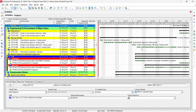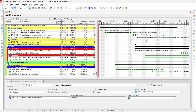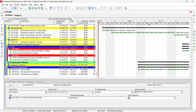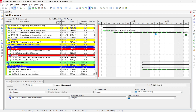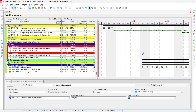With bar necking enabled, all non-working days will be shown as notches within the activity bars. Be aware that when working days are displayed this way, it shows only the actual working hours — for example, from 8 a.m. to 5 p.m. — so the bar does not fill the full day. If you enlarge the view, the working portion of the bar covers only 8 a.m. to 5 p.m. Make sure the global calendar reflects the correct working days — for example, if Friday is a holiday and Saturday and Sunday are working days, adjust the global calendar accordingly.